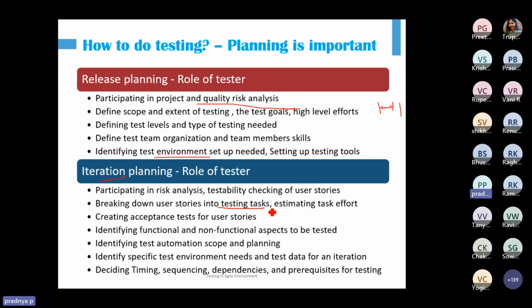If we are following planning poker or any kind of estimation technique, from a testing perspective, how much complexity are we looking for in this story? It may happen that some stories are very easy to implement, but difficult to test. You need different kinds of data to be created. You need a specific setup to be done. So as a tester, I need to be